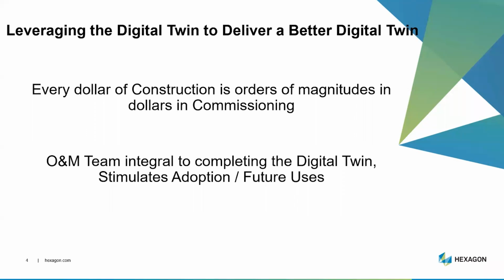So they started to bring in their own people and say, hey, can we take the P&IDs and walk through the model with them to ensure that what's in the model agrees with the process design and we can make corrections along the way? Yes, you can do that. And we showed them how. So now they had a better representation of what they were going to actually walk down during pre-commissioning. Operations and maintenance would come back and say, well, we saw how you do that. Can you do something like this? Well, yes. Can you tell us what you're looking for? Yeah, we can do that.